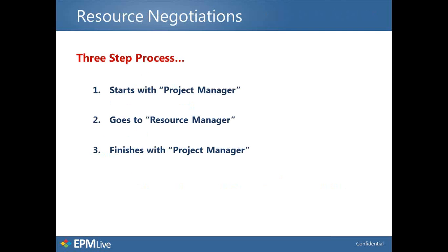So what we're going to show you is a 3-step process. Now, sometimes there could be more, but today we're going to keep it simple. We're going to start with myself as the project manager in the project center. Then once I save my resource plan, Christina will take over. She'll get an email indicating that I created a resource plan, and it's up for her to approve those possible commitments.